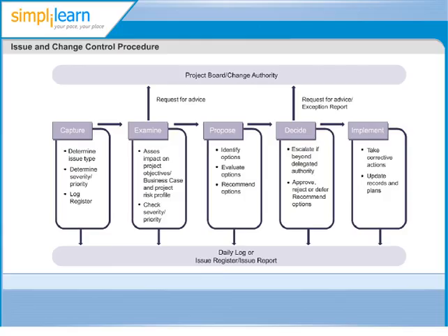The next step is to examine the issue by undertaking an impact analysis. The impact analysis should consider the impact the issue has or will have on the project performance targets in terms of time, cost, quality, and scope. The project business case, especially in terms of the impact on benefits. The project risk profile, i.e., the impact on the overall risk exposure of the project.